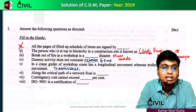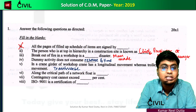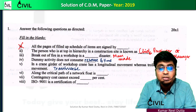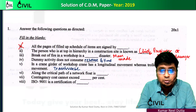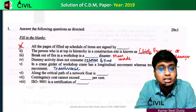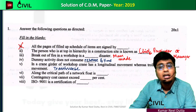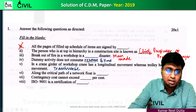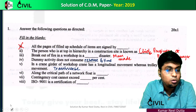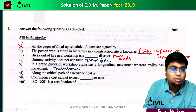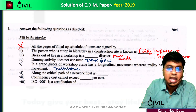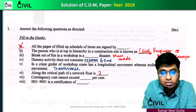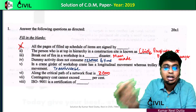Number 6: along the critical path of a network, floats are zero. I have posted a detailed explanation video for this earlier — it was also a question in 2018. Along the critical path, the float is zero. I will provide a full explanation video for your semester exam.